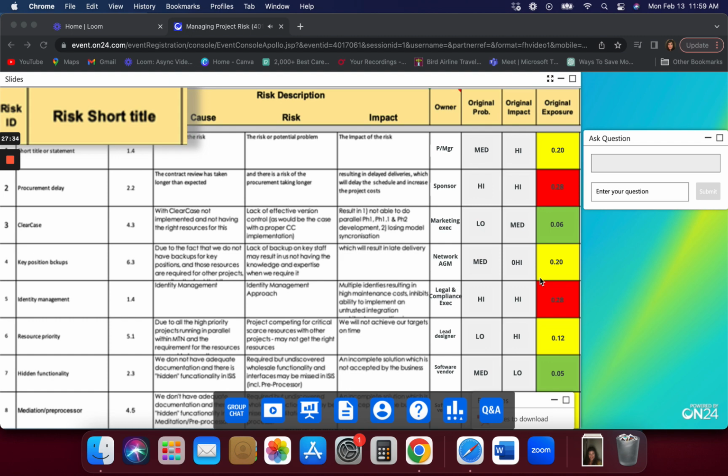We then put in the meta-language description, and of course you're an expert on that. So in this example, we put the causes, the risks, and the impacts in different columns. I normally do that. And then we assign an owner. I've only touched very briefly on ownership, but it is very, very important, because your owner is going to take ownership of each individual risk that's allocated to him or her and take it forward through the risk assessment phase and through the risk response phase and so on. So ownership is something that is very, very, very important.